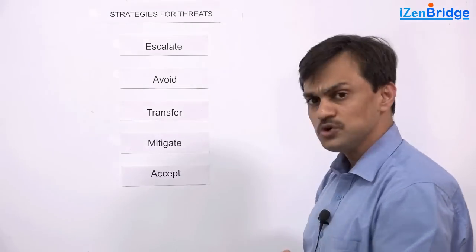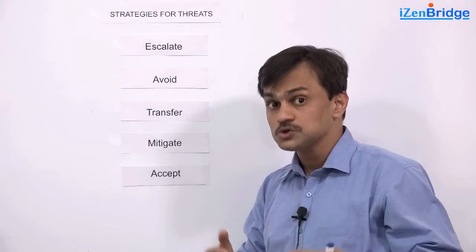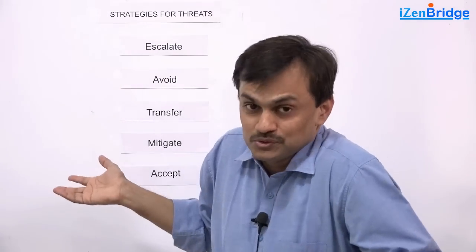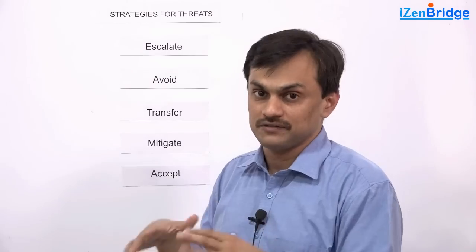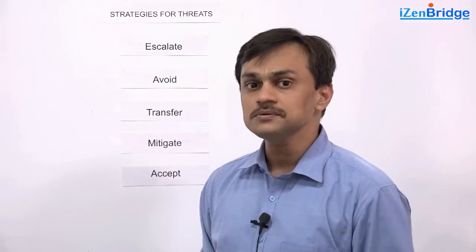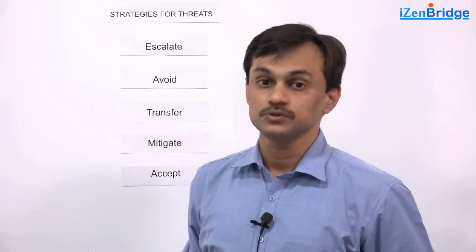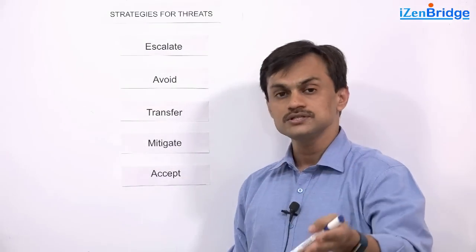Once you escalate the risk, you may not remain an owner. So you need to make sure the other person accepts it. It is not like I have sent an email to you, now it is up to you if you look at it. As a responsible project manager, whenever you are escalating something to the next level, you need to make sure that other person is owning it.